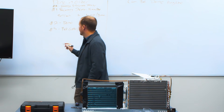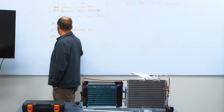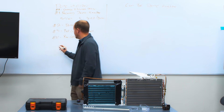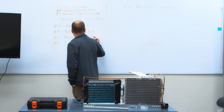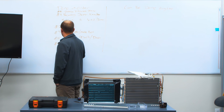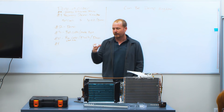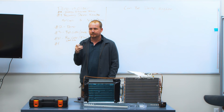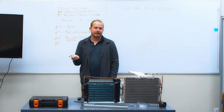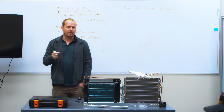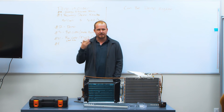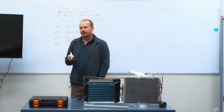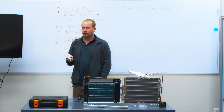Then you actually run copper, flush, drain, and stat wire — all at the same time or in close sequence. Why is copper so critical to the process and why does it need to be done early? Because you can't do other steps until it's done. When you're doing a change-out or replacing an evaporator coil or compressor — anything requiring piping — your goal needs to be to get that system sealed up as quickly as possible. Everything else goes on the back burner until that piping is done.